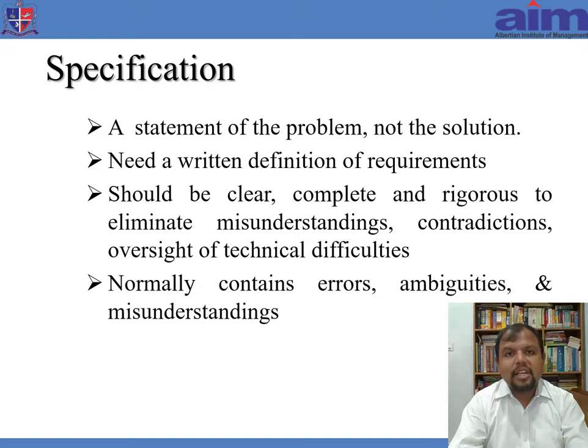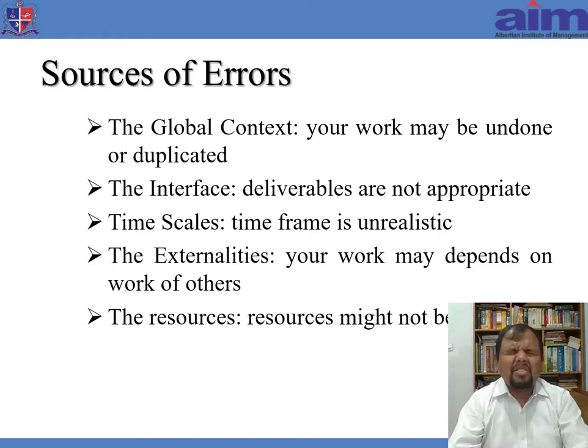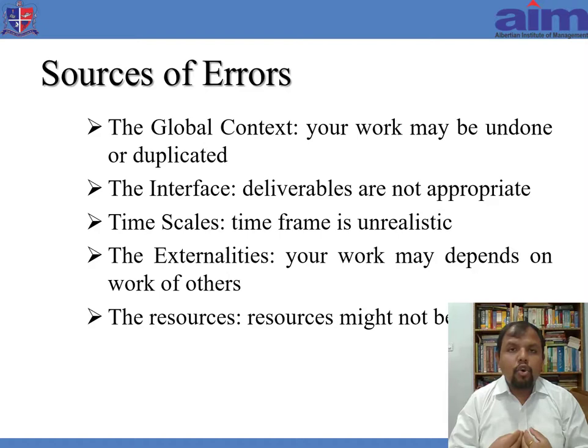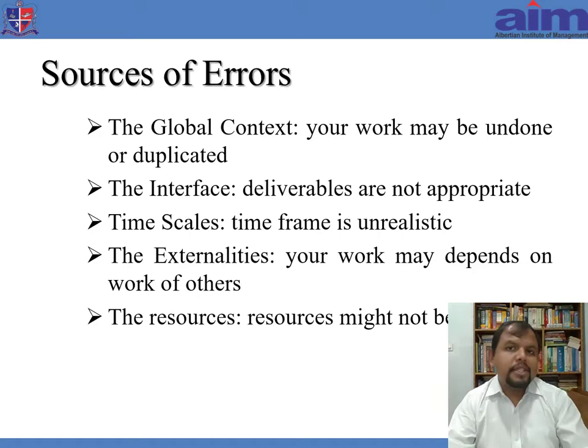Once you specify the entire project, it normally contains errors. Let's look at some common errors. The first one is global context. In a project team, each person has been assigned a task, so I might not look at the larger perspective. I do whatever work has been assigned. And sometimes if I don't look at what the larger picture is, the work done by me may need to be undone by someone else so that it can fit properly into the project, or it might be duplicated.